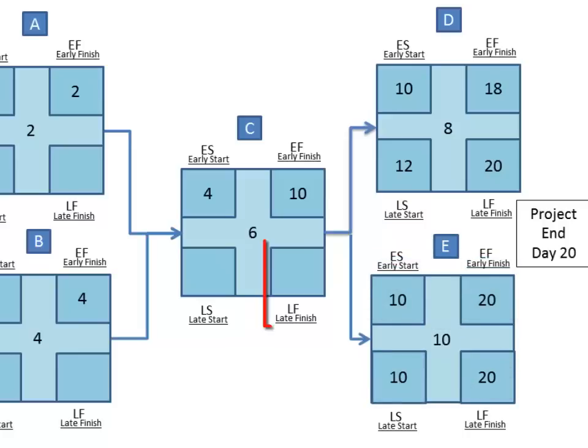Now we need to determine the late finish for task C. Since we have multiple successors D and E for the predecessor C, we'll need to make a choice. For this situation, simply choose the lower of the multiple late starts, which in this case is of course ten.